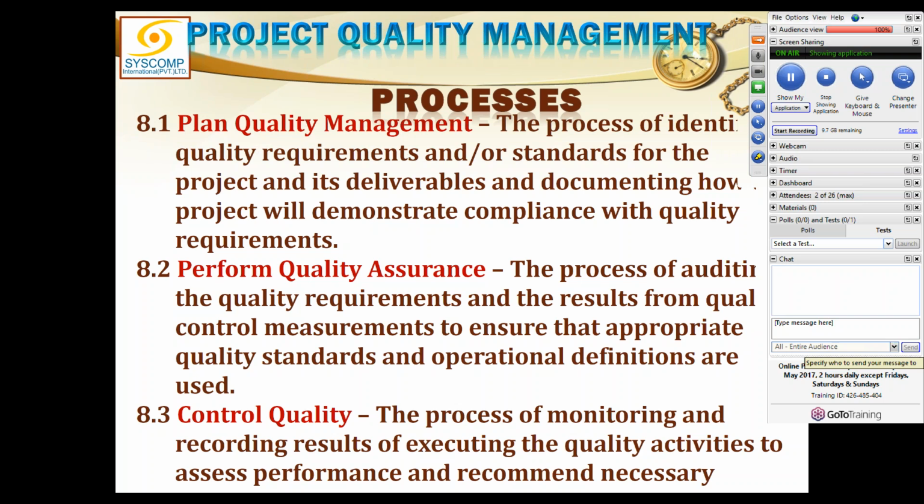If you find that people are doing something but there is no record of how the process should be done and everybody is doing it in his or her own way, then there is a problem. We do not have documented processes. That means it will cause problems. So if you catch it at this stage and you say there are no documented processes, how can I check? Then that is the point where you have to develop those documented processes.